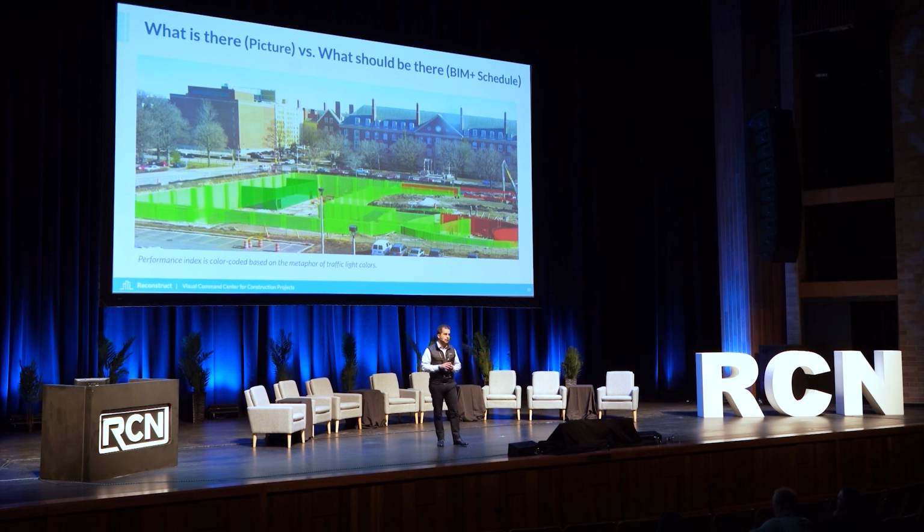What you see on the screen is a 3D design. This can be 2D; in the case that I'm showing you, it is 3D. It's being tied against the project schedule, so it only shows you the elements that are relevant to today's date, and it contrasts against the picture. Guess what? By the time I've been speaking about this slide, all of you have been paying attention to the area that's been color-coded in red, right? So we can save time in our coordination meeting, immediately bring attention to the area that is at risk or has already been delayed on the job site.